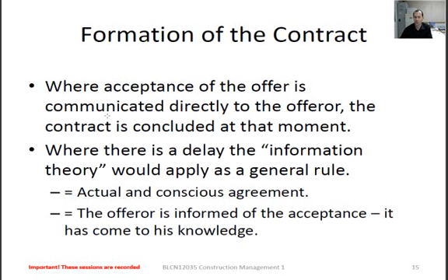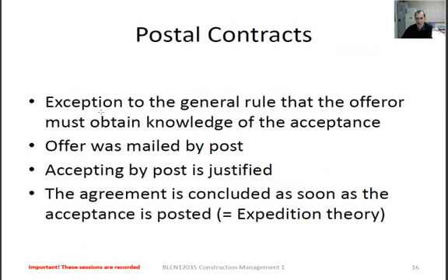And Morgan, have you got a question there? Oh no, just an answer for the mail. Isn't it on the day that it was posted with the stamp, the postal stamp? That's correct. That's the postal rule. Great. It's actually really nice that you guys take part, because it makes it a lot more interesting. And there's our next slide dealing with exactly what Carl has just told us. If it was mailed by post, the day that the envelope is posted, that's when the contract comes into effect. So there we go.